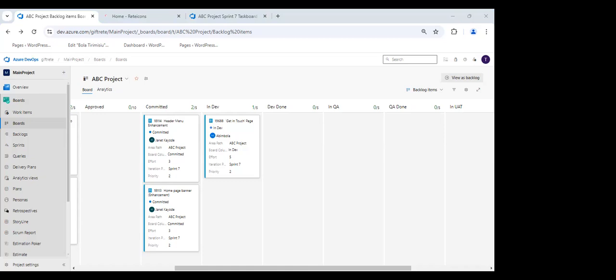So that product backlog item is where they selected from during the refinement, and the BA started working on it to refine it properly until they got an approval. So they put it in the approved column. Then they came for this sprint planning meeting to discuss the things under the approved column to now commit them to the sprint. So that's that whole journey. So don't worry too much about all these titles, because I know some people will have a lot of questions on this. When we're doing the Azure board setup on Friday, we will take you through all these columns, so you have more understanding of what each of them is talking about.